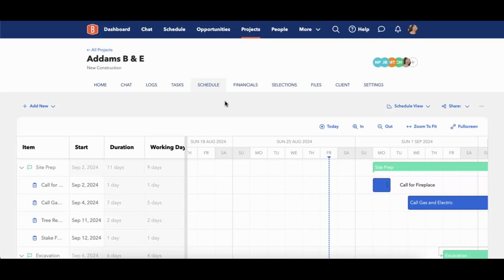Schedules are mainly built within projects, so anything like your Gantt chart is going to come through your projects in the scheduling tab. Opportunities have a plan schedule within them, so you can essentially estimate a certain amount of time, and you can also create tasks for your opportunities, but they're not really scheduling tasks. They're not meant to be worked like a Gantt chart schedule task or anything like that. So this particular schedule that we'll be talking about is the one that's in your project.